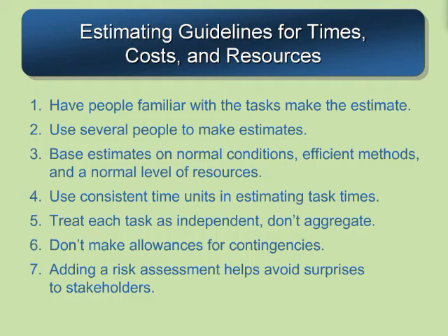When you're doing estimates, let's make sure that we're talking about estimates that are based on normal conditions, efficient methods, and a normal level of resources. So then if we need to do things like bring more resources on or put people on overtime, we'll know that's above our baseline.